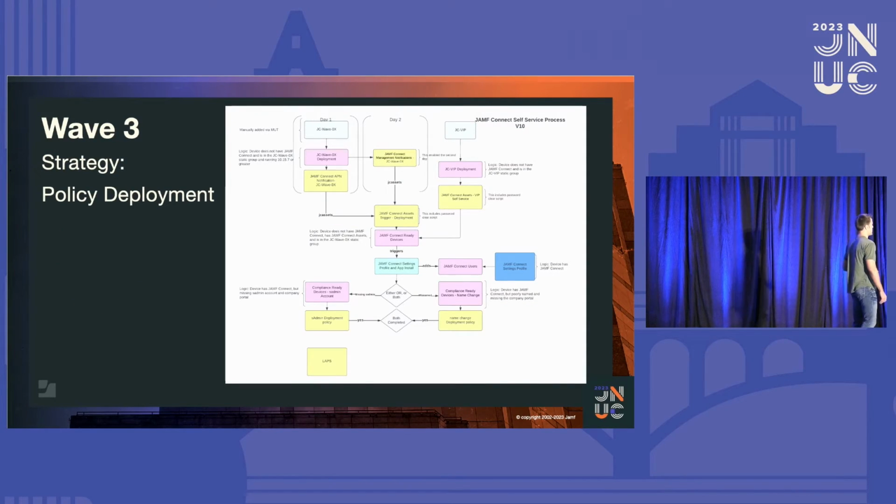We also transitioned from a profile deployment to a policy deployment, kind of. Now, we kind of were set with profile. Profile is going to be the way we deploy Jamf Connect. The problem is users can't opt into a profile deployment. When we say, hey, Wednesday we're deploying the profile, Wednesday you got the profile. That's not great, because Wednesday at what time? We have people in India. I'm deploying it at 4 o'clock in the afternoon for me. That's not great for India when they wake up and immediately get a profile and then immediately get Jamf Connect to pop up, and then they have 20 meetings and they forget about restart lockout, right?